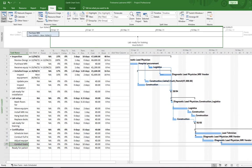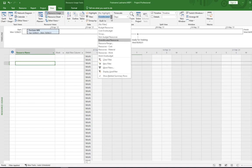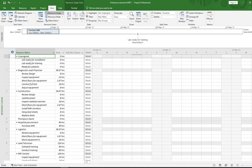Next, we're going to view the resources. Click on the View tab and then click Resource Usage. Earlier we set this to show only over-allocated tasks, but since we've fixed all those issues nothing is showing. So in the View > Data > Filter, go back to No Filter. Resource Usage has summary rows for each resource and indented rows for each task assigned to that resource — a good way to see how over-allocation occurs and what you might need to do to resolve it.